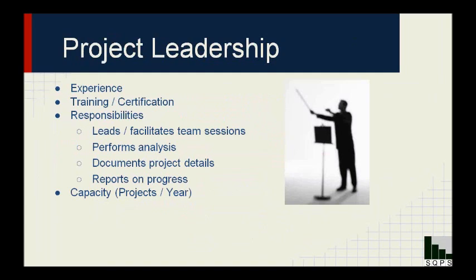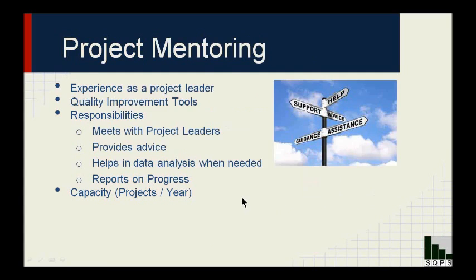It is also important to determine the capacity for each project leader, like how many projects per year they can work on. So you assume they are going to spend maybe 4 hours a week or so on their projects, and then determine how many projects they can have, or whatever number of hours they can spend regularly. Mentoring is important, and this is often forgotten because sometimes project leaders could get tied up and not pay attention to their project.